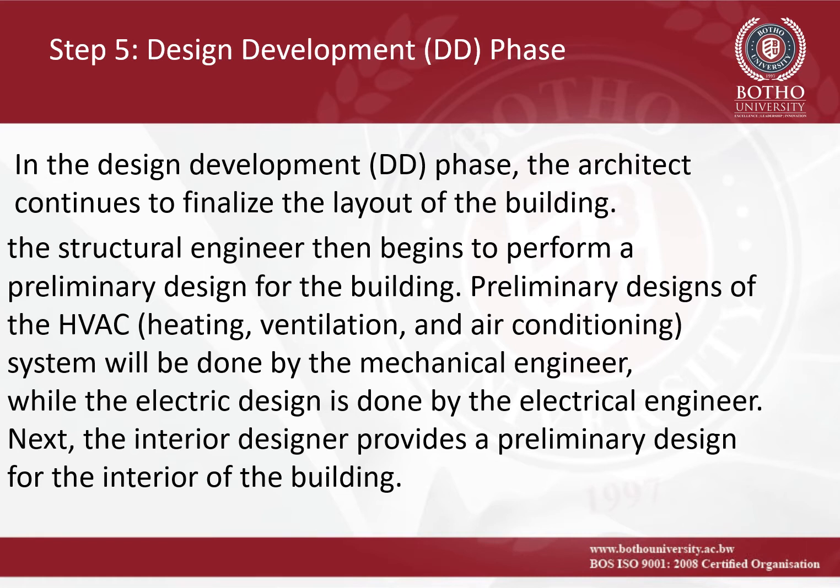The structural engineer then begins to perform a preliminary design for the building. Preliminary designs of the HVAC, heating, ventilation, and air conditioning system will be done by the mechanical engineer, while the electric design is done by the electrical engineer. Next, the interior designer provides a preliminary design for the interior of the building.